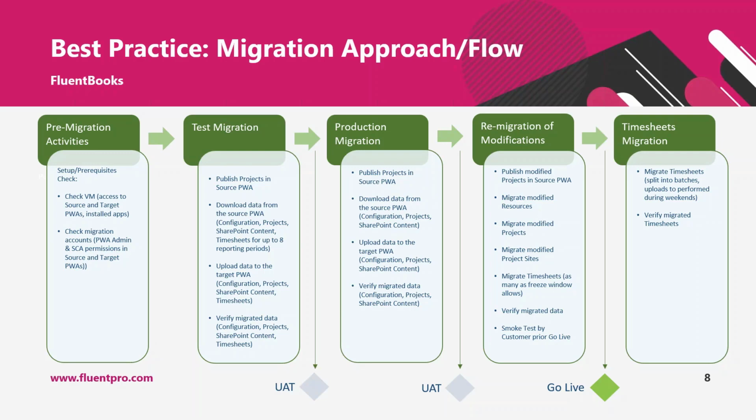Usually during test migration, if it's migration as a service, we would migrate up to 8 time reporting periods of timesheets, like not the whole set, but only part of it, to test reporting, to let users do UAT on the timesheets.